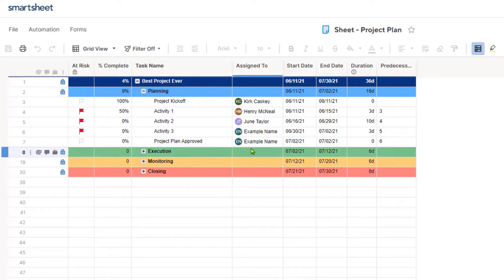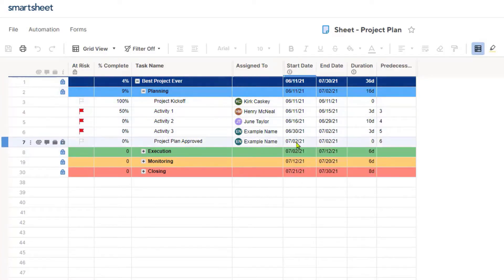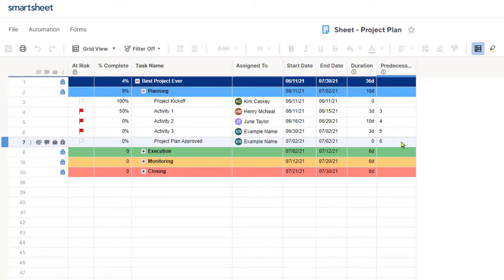You'll see that we've got an assigned-to column here — these would be the human resources working on the task. We've got a start date, an end date, duration of each of the tasks, and of course, predecessors. I'm a big advocate of having predecessors, which is a task that comes before another task. It's building logic into your schedule so that you don't have to manually update the dates — if I change the duration of one task, it automatically changes the dates of tasks dependent upon the previous task being completed.